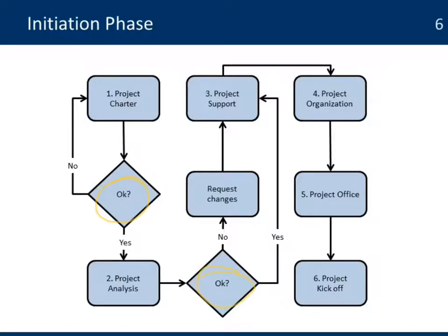Like we said before, it could have been a very long time between the project being approved by the donor and the moment you're implementing, and there could have been some changes. So if you see some changes, some additional risk to the project, you need to modify or ask for those changes, so that you're not starting a project that is going to have problems from the first day. You continue all those steps until you are ready for your project kickoff.